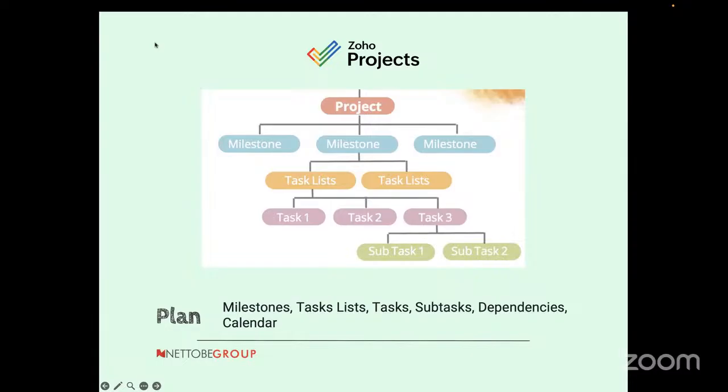Because let's say you break down a project so a task is at least 1 week, if there are issues within 2-3 days and you don't catch them, that's already a breeding ground for delays and other risks that you might not have caught on to. So basically that's how it's suggested that you should break it down. And Zoho Projects helps you to break it down easily.